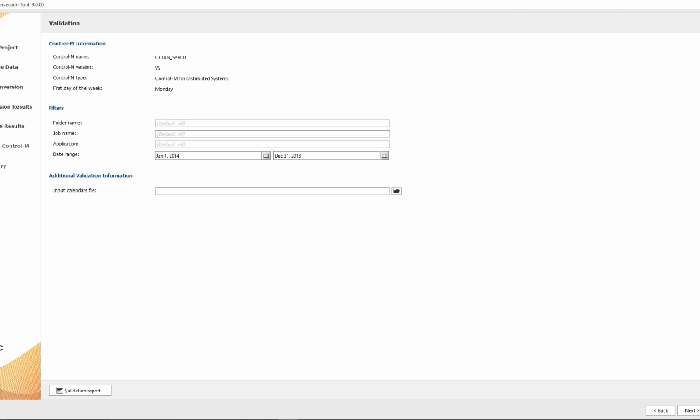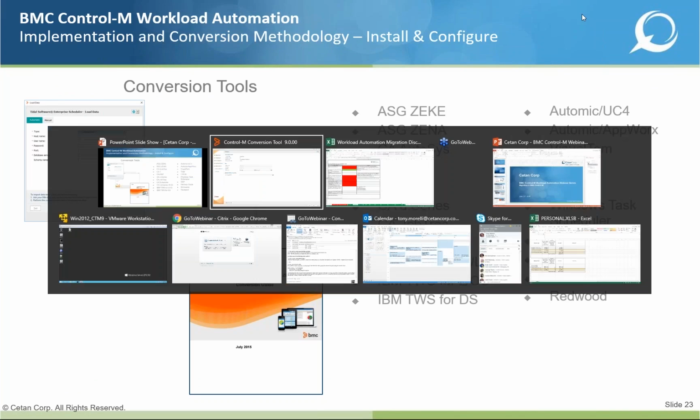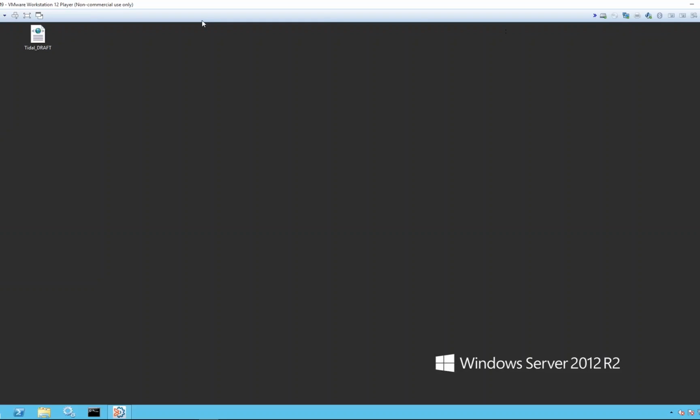So this is part 2 of that discovery I mentioned. Part 1 is our discovery questionnaires and the more discussion-based data gathering. Step 2 is getting the data, running it through, analyzing it, and being able then to look to see what might shake out that we either need to account for in conversion timelines or factor into our plan if we need to go back and correct or remediate anything, so that way when you get the final product, all of these items are fully addressed.